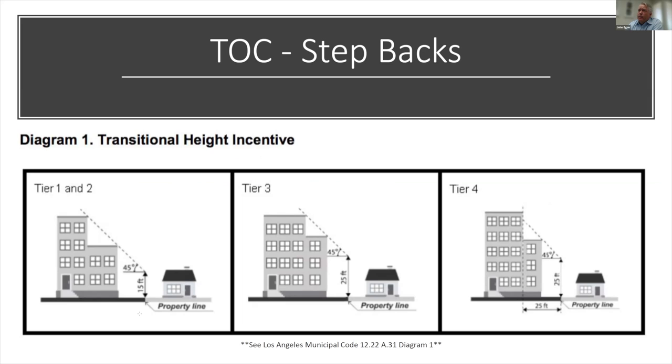What we have found, we had this occur where we had a historic property adjacent to us, and the city came and asked that we had a setback associated to view and light preservation. In that case, it was not directly associated to the underlying zoning, and it was a requirement placed upon us by the city, but it can have a very serious impact on your project.